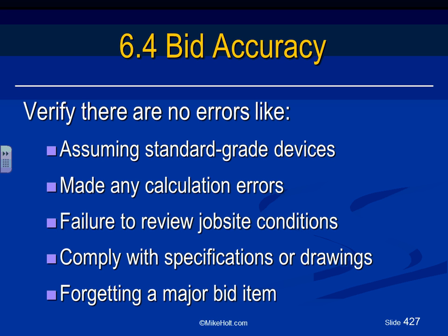Failure to review job site conditions. Remember, we have a list of job site conditions. The project will be constructed in Minnesota in January. You know, that will be cold. You might have to heat the place. So the productivity of the people is going to be low.